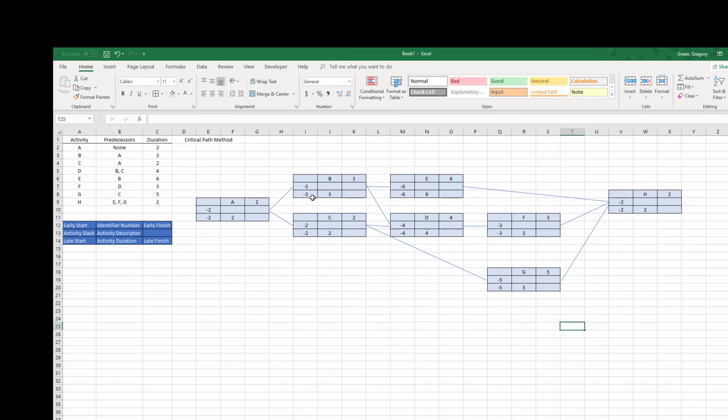All right, with all of these patterns, these paths, a path is a way to get through the tree. So there is a path that goes from A to B, E to H, A to B, D, F to H, A, C, G, and H. So there are at least 4 paths in this tree.